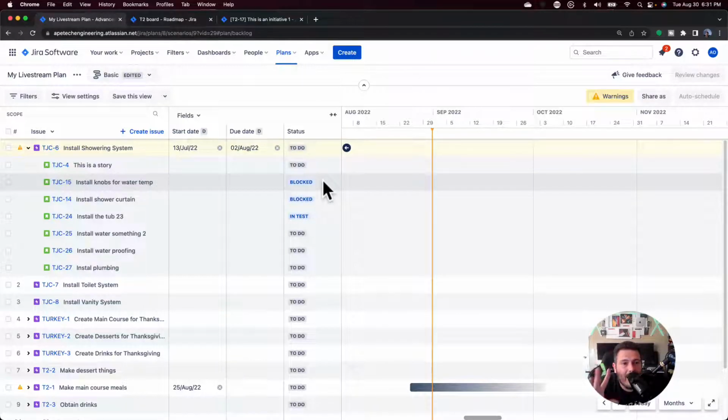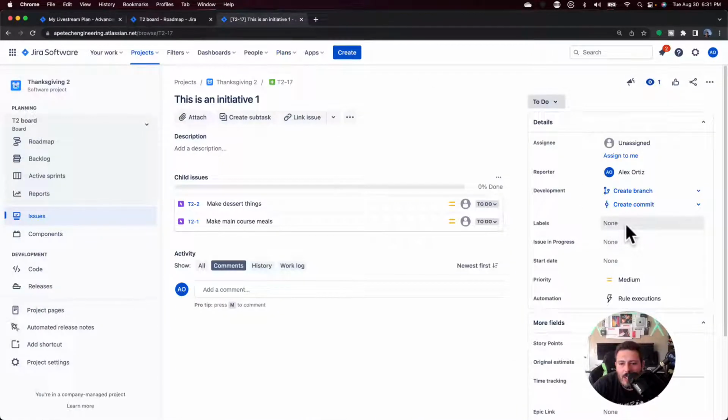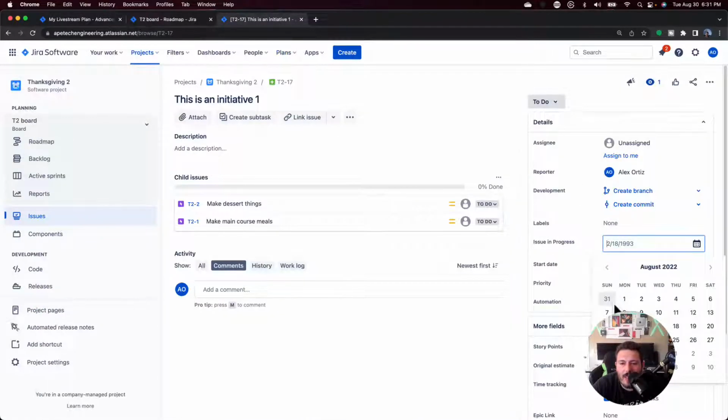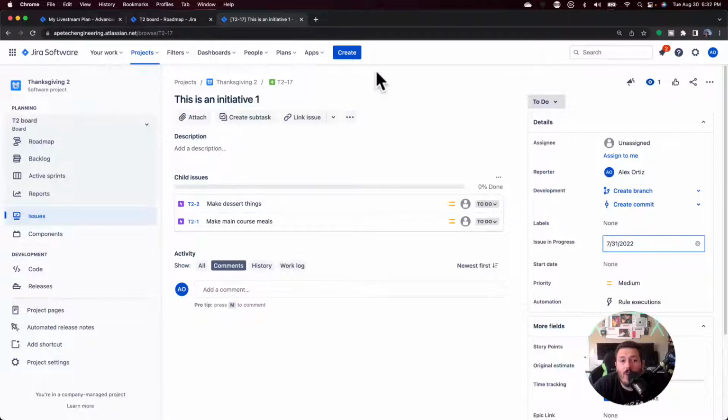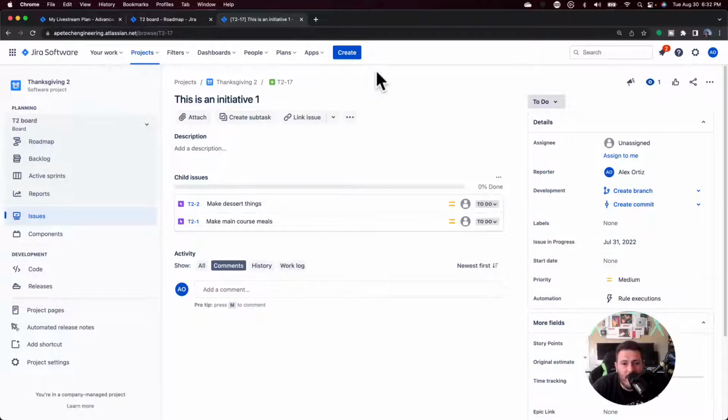And remember, they're not going to get saved to the project because they still don't even get pushed to Jira until you hit that review changes button, right? But again, if you're struggling with it, it's just muscle memory, because in native Jira, most of the time when we add something, I can click on it, click away anywhere I want, and it will register and save.